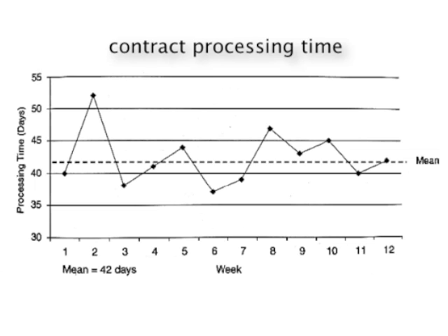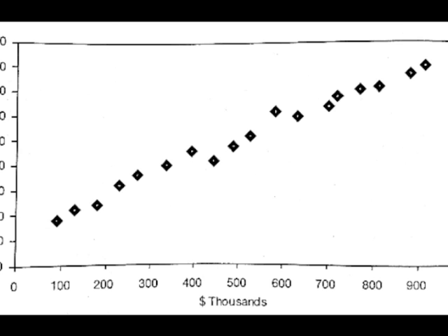Maybe the cutoff day should be 52 working days before the end of August, an amount of time equal to the highest number of days shown by the current data. This does not seem like a good solution. Besides, the contracting office is likely to announce that it will stop serving customers on the 1st of July or before. The task manager takes another look at the scatter diagram prepared earlier to determine that contract processing time seems to be related in some way to the dollar value of the contract.